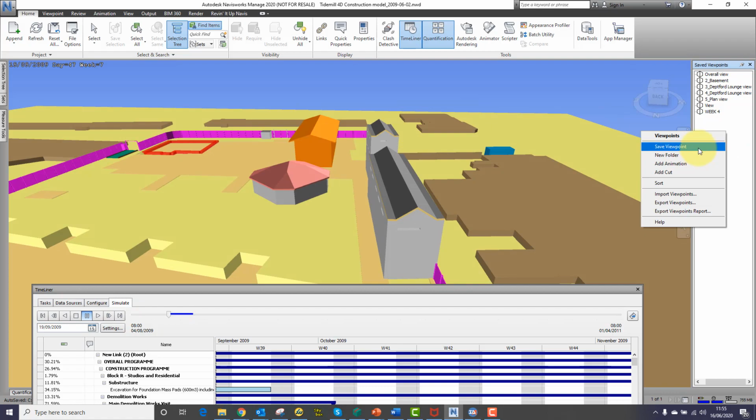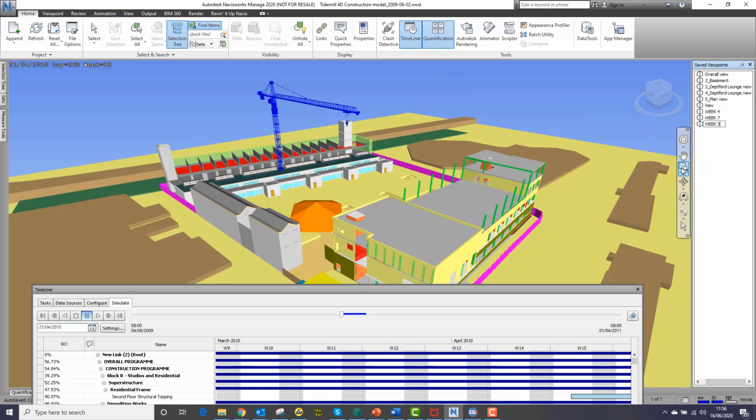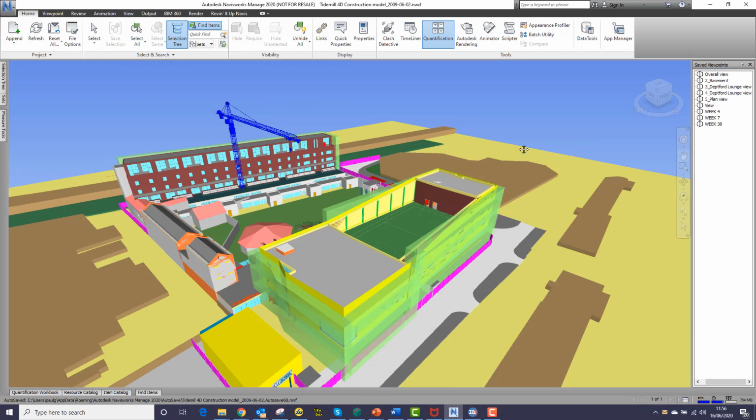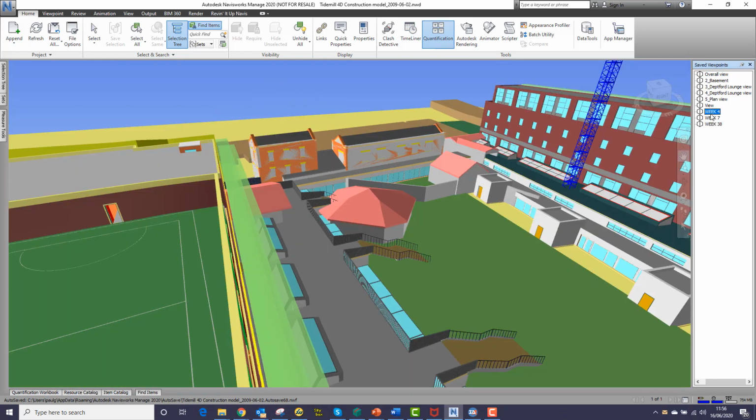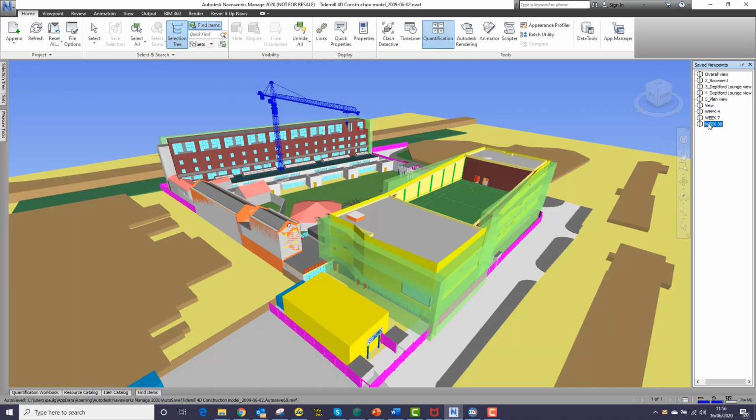To show you what I mean, here I'm making saved views for weeks 4, 7 and 38. Although we can save the view, we cannot save the timeline, which means that if I close Timeliner, we won't be able to recall the construction situation for those dates, and any extra information and documentation we added will be hidden from view, as you see here.